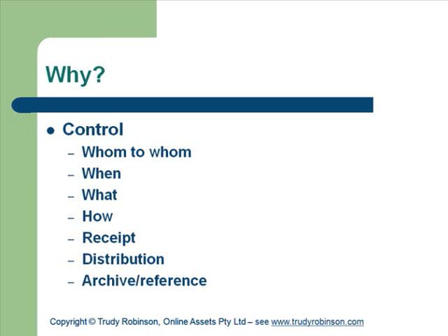Now, the company didn't know that had been sent. But when they started arguing about back charges in court, they were able to say to the judge, well, this is the excuse from the company we received on the day, that it was their problem, not ours. Whereas the original company was saying, no, we made the delivery on time, your cranes weren't ready, we had to wait, our vehicles were tied up. That can completely change the outcome of a court case. So how you allow communications to go out is a really big one.